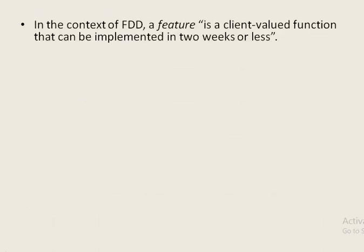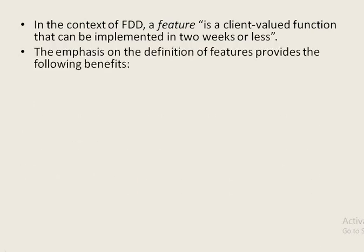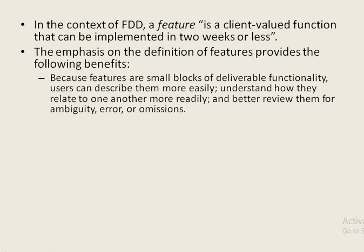In the context of FDD, a feature means a client-valued function that can be implemented in two weeks or less. To implement a particular feature, it takes very little time. Feature Driven Development provides some benefits: because features have small blocks of deliverable functionality, users can describe them more easily, understand how they relate to one another, and it helps them review better and analyze ambiguity and errors during development.